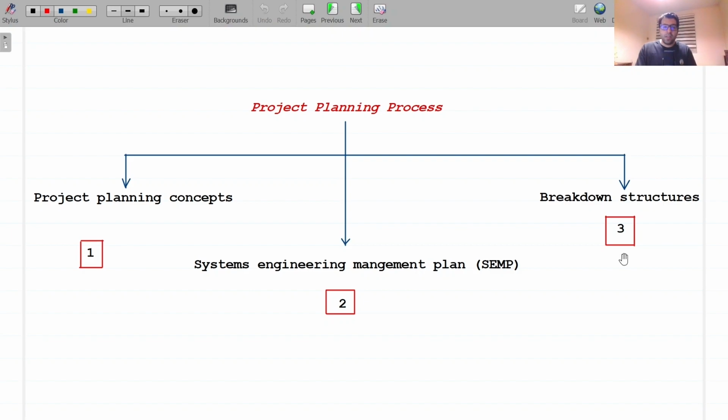The WBS serves as a reference for the identification of cost elements arranged into a cost breakdown structure or CBS. Along with the overall management organization, the WBS is also used to determine who does what. This is represented in an organizational breakdown structure or OBS, which is a hierarchical tree of the organizational elements.